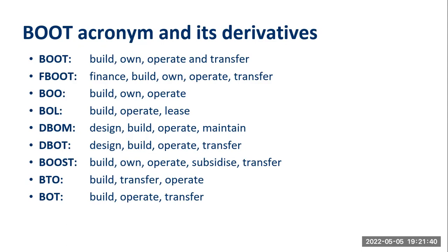In some circumstances, if you are the project management company and you have been contracted to build something, you build it and you own it, you operate it for some time, and then you transfer it to the client.